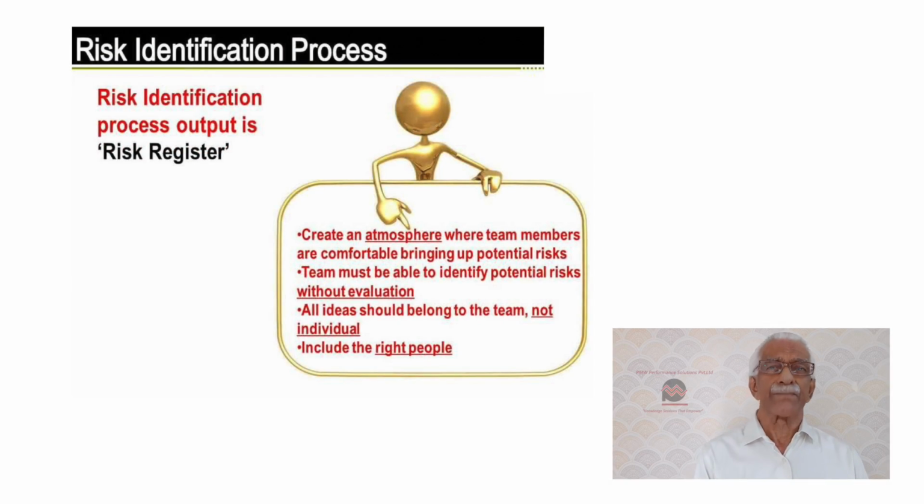A quick example could be that you have a possibility of ordering equipment for the project, and if you order in bulk, the supplier is willing to give you a discount. That's an example of an opportunity where you take the advantage of there being the possibility of buying at a reduced rate if you order multiple quantities. So that's the example of an opportunity.